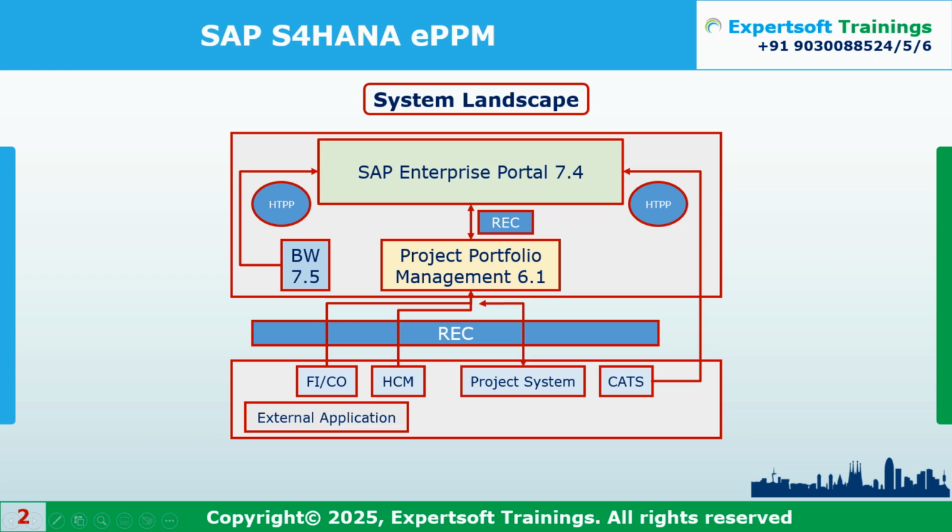If you want to integrate this ePPM suite with any third party, like Primavera or MS Project, and synchronize the data, then the ECP connector is required.